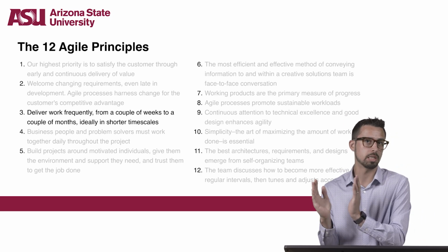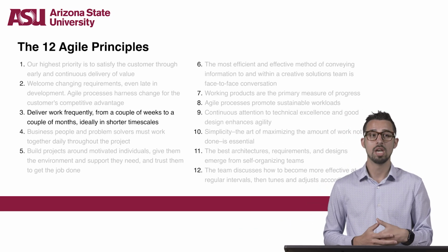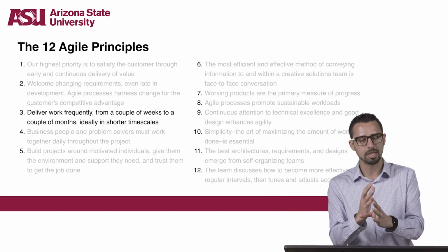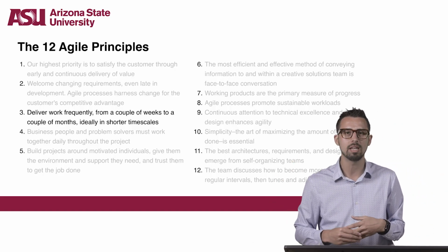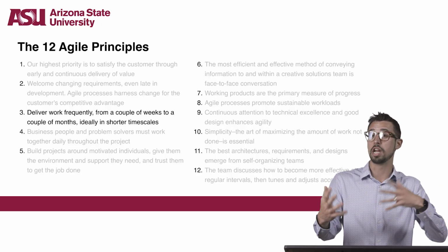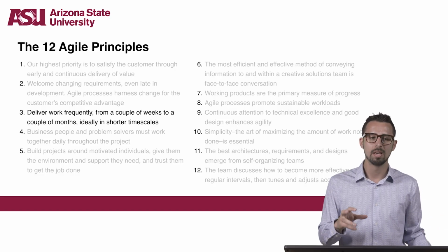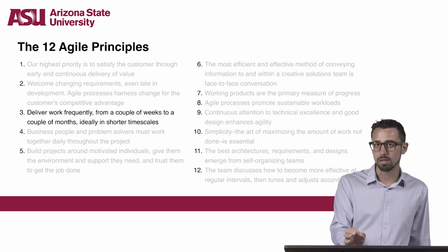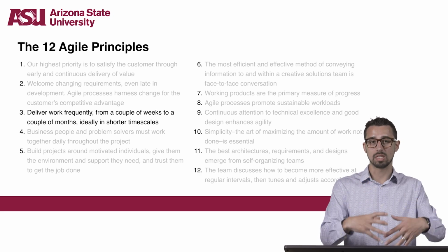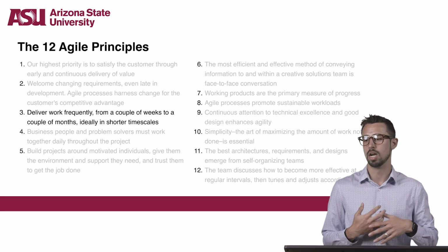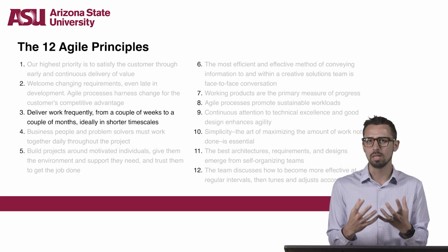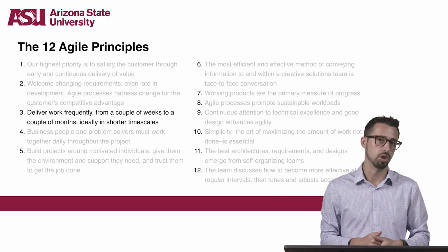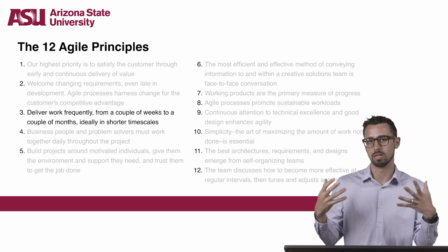You can have a 1-week sprint if your team is able to move through it a little bit faster. You can have a 2-week, a 4-week. Some teams I've worked on, we've had 8-week sprints. It's a little long. That's not quite the short iteration cycle that you need in an Agile project. So your change requests are going to take a little bit longer to adapt to. But the very important part there is that at the end of each cycle in an Agile project, you have something to deliver, whether it's a work in progress or a final product. You really want it to be a workable product, whether it's something that you can give feedback on or something that can actually go out into the world. Doesn't really matter, but focus on something that is workable.